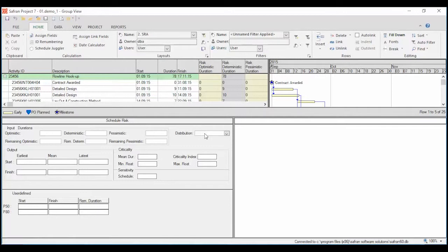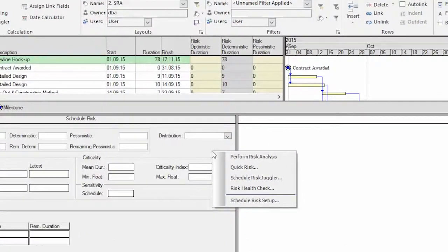We start with a quick risk, a feature that allows you to set optimistic and pessimistic duration as percentages of the activity's duration.